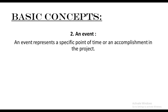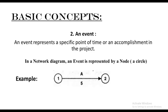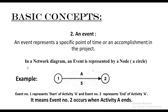Second: an event. An event represents a specific point of time or an accomplishment in the project. In a network diagram, an event is represented by a node, that is nothing but a circle. For example, event one — a circle with node one — represents the start of any activity. In this case, activity A, and event number two represents the end of activity A. So activity A starts from one and ends at event two. Event number two will occur only when activity A ends. An event is always represented by a circle.